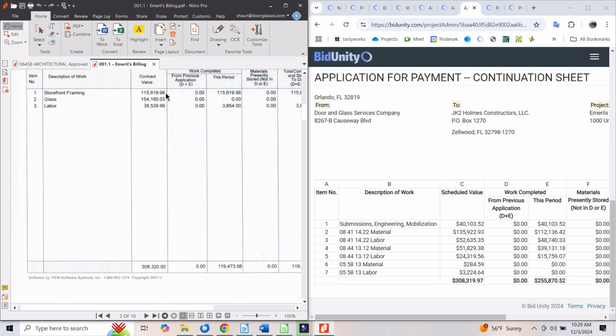So they got a price from that company, and then they called me and they said, hey, we're just going to have this other company do the glass. And I said, well, okay, the glass cost me about $26,000. It'll take a week to put it in, so it may be like $35,000 for me to do all of the glass. And they said, okay, well, send us a change order. And so I sent them a change order and followed up, and they said, well, we're going to pay them based on what it costs, and don't worry, we're going to treat you fairly.